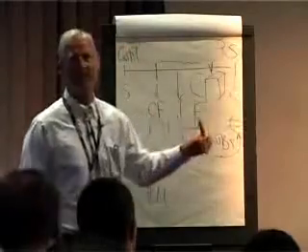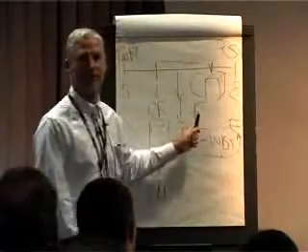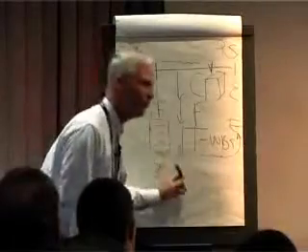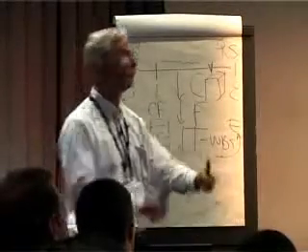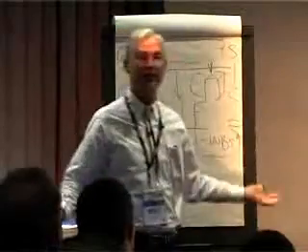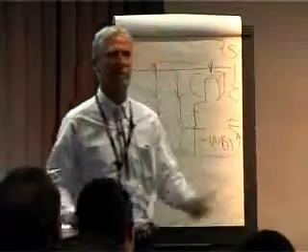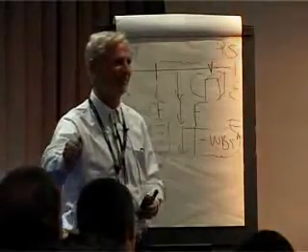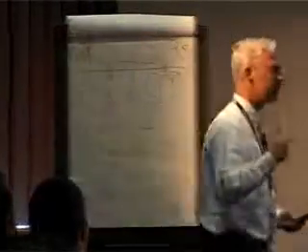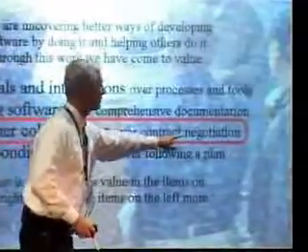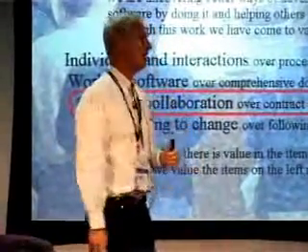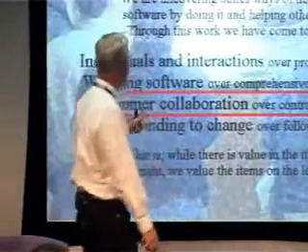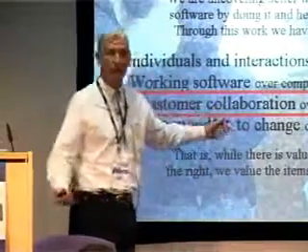And of course, now that you've got 5% technical debt, everything's going slower for the second release cycle, and then the third cycle, and then the fourth cycle, and this downward spiral, until finally the customer says, man, there's no way we can even work on this system anymore. Let's outsource it to Vietnam and start the next generation system. So that's the traditional game of product development. This is the contract negotiation game. And these dynamics are what we're addressing in Scrum and other Agile methods because we move instead to customer collaboration.